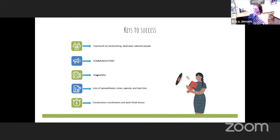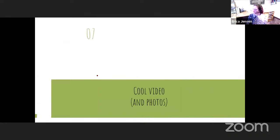Additionally, behind the scenes to make the purchasing and bid process go smoothly, MOA Purchasing put the 65% plans on their website ahead of the bid so that they could do a shortened bid period and not frighten off the contractors. So the contractors knew it was coming at the 65% design. So there's a lot of moving parts and pieces to make sure the end goal was met in terms of design and construction and schedule.